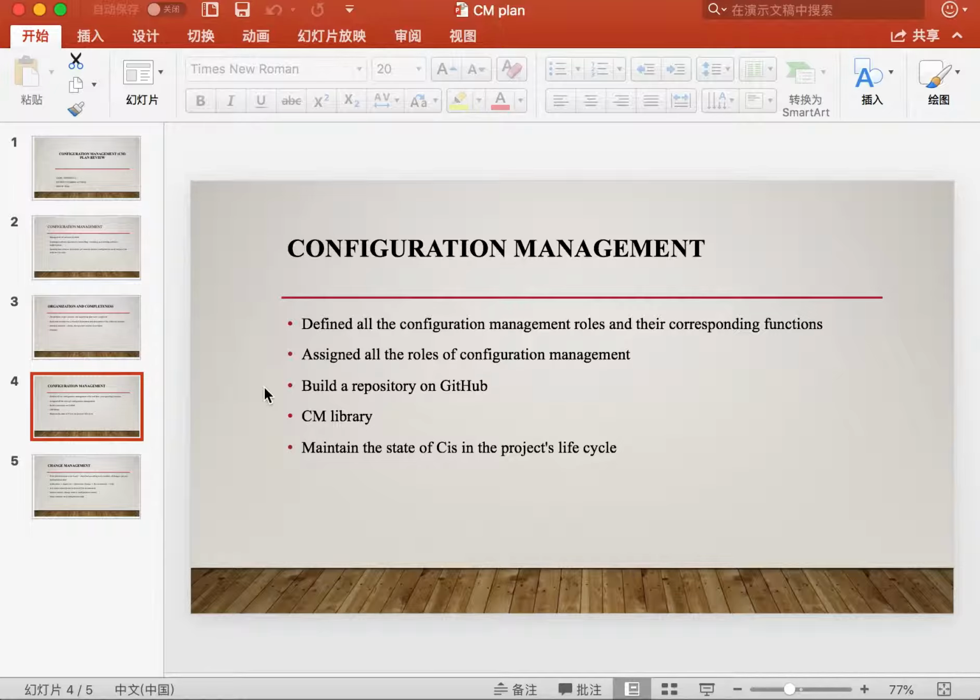Upload the file to the CM branch after approval by all members, and create the change list to monitor any changes to the file, and assign the permission to each project member, and they operate the configuration library according to his own permission. The configuration management maintains the configuration library on time, such as cleaning up the junk files and so on. We absolutely ensure the security of the CM library, and also restore all the CM documents in case the CM library is lost.